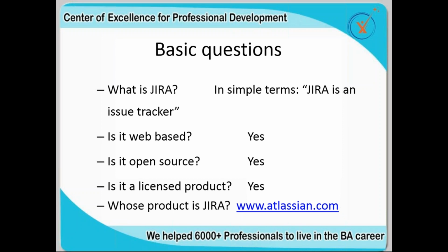It is broken down into user stories. To start with, any requirement is broken down into user stories, and from there it is moved on to the product backlog and then to the sprint backlog. Unlike a sequential waterfall model, where the next step starts after completion of each step, here any requirement which comes in the middle of the project can also be handled with the help of Agile Scrum. So it's more adaptive, and any requirements can be worked upon, unlike any other model. It is lightweight and not cumbersome, in short.